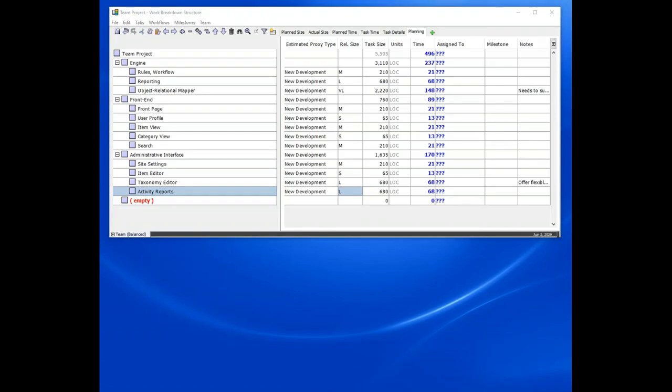So even at this early stage, with just the information that we've entered so far, we have a very rough idea of when the project might finish. And even at this very early stage in a launch, this might be enough information to realize that it might be important to raise a concern with stakeholders if the expected delivery dates don't look like they can be met.